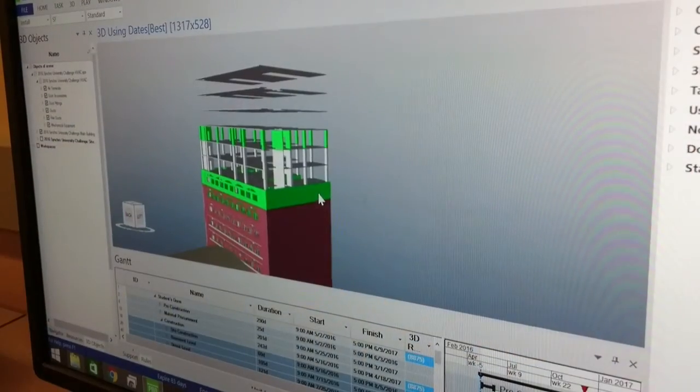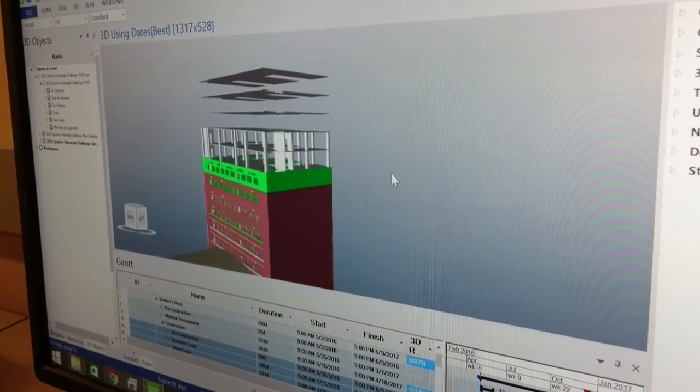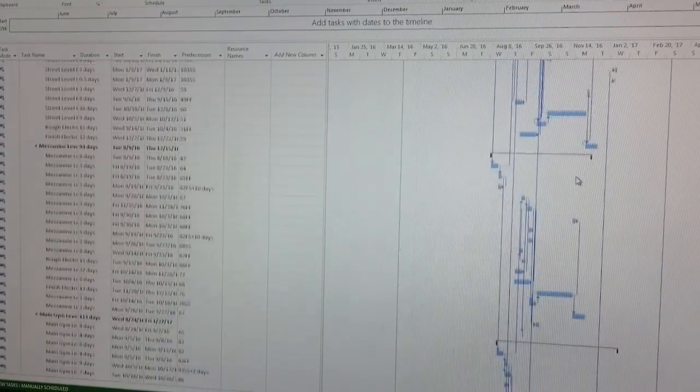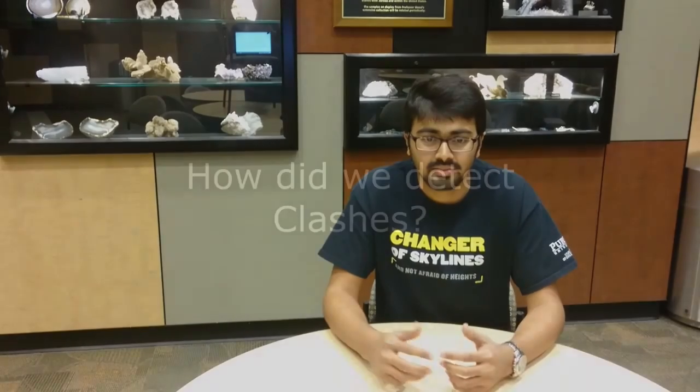Identifying and correcting schedule effects — when we visualized our 4D model, we noticed that our schedule was not perfect. This visualization helped us correct those errors by identifying them in the 4D model and then revisiting and correcting the corresponding activities in the schedule. We think this is an invaluable feature, as it helped us improve our schedule by a very good margin.